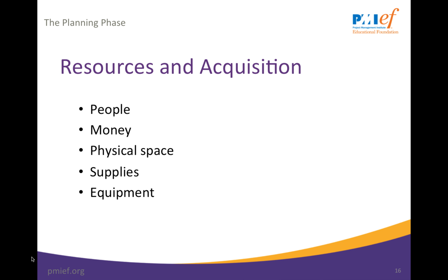Resource planning means considering all the things needed to complete the project. This might be person hours, money, physical space, supplies, or equipment. When considering resources, it is useful to pair them up with the schedule. When do you need each specific resource and for how long? Is acquiring the resource an activity that should be added to the task list? Ask your group this question.